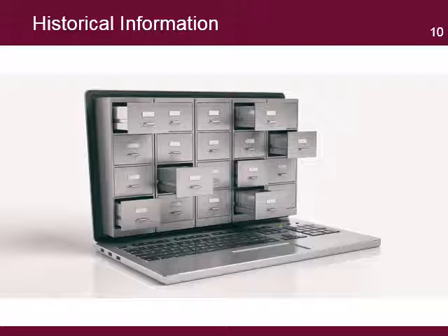After the project has specified the contents and location of the records that must be maintained due to legal requirements, it should be easier to specify the other types of records that should be retained for programmatic purposes. Incorporating historical records management into the information management plan enables a project to know what records it has and where they are located, properly identify and store records that must be legally maintained either permanently or for a specified period of time, and know when it can legally destroy records to minimize record storage issues.